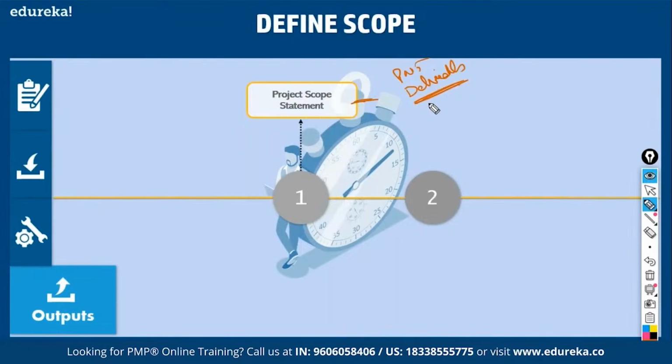So you come up with a lot of deliverables. These are all interim deliverables. Then the final deliverable will be the pen that we're going to prototype. So it defines all the deliverables. It tells you what the acceptance criteria are. How do you get this deliverable accepted by the customer? What are the tests you have to do? What are the test results you provide him?